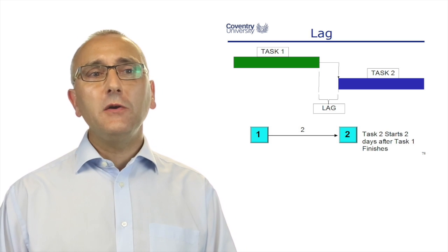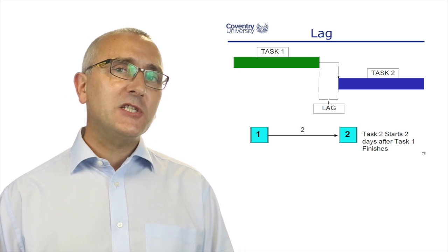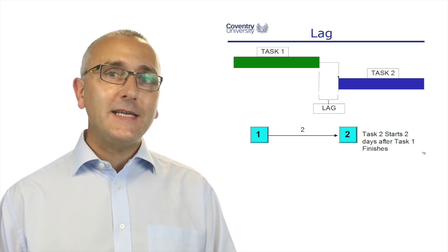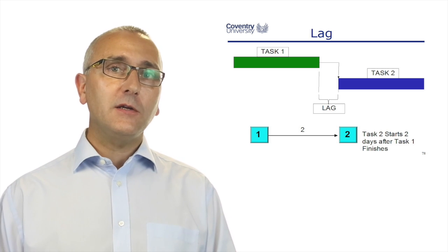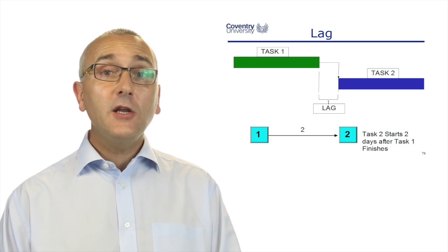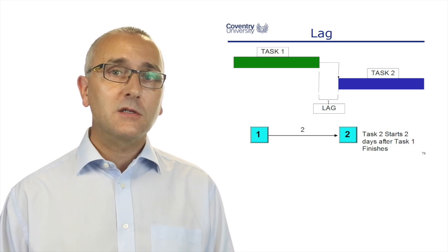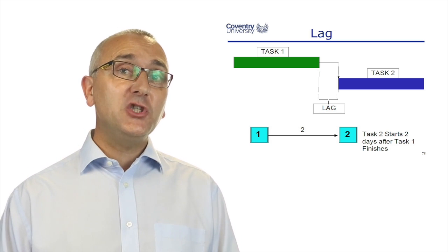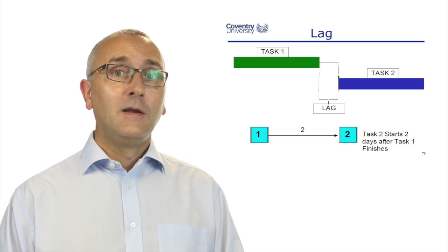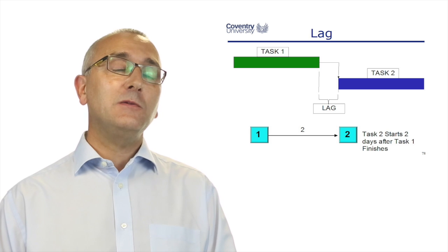Very often in the Gantt chart, it's shown as a gap. I would suggest you actually create a task that defines what that is. Concrete drying time. So give it a task name, put it on the work breakdown structure. Nobody does it, it's got no costs. Transportation time, that might have costs, somebody has to do that, but it is a delay between task one and task two.